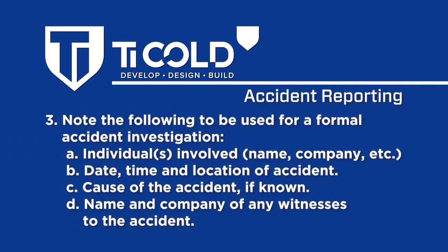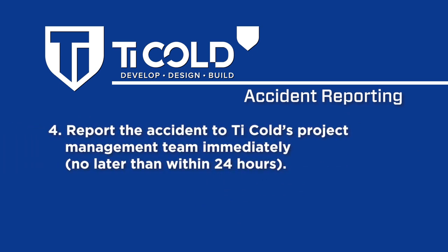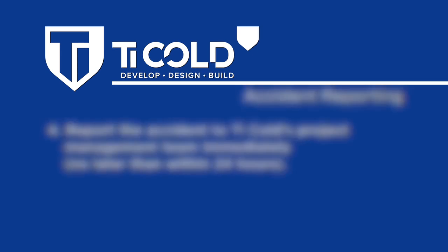Number 3. Note the following to be used for a formal accident investigation: individual or individuals involved, the name, the company, etc. Date, time, and location of accident, cause of the accident if known, name and company of any witnesses to the accident. Number 4. Report the accident to TI Cold's project management team immediately, no later than within 24 hours.